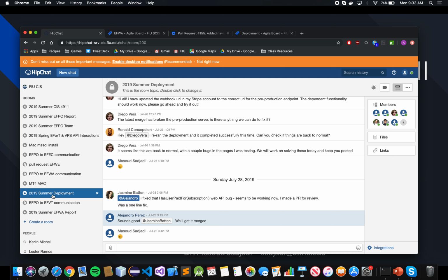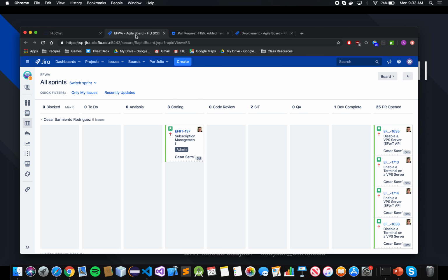Once you have all this done, the second tool that you will need is the Scrum board for the team that you monitor. You need to familiarize yourself with this board on top of your own board. The stories that are here are the ones that you will eventually be testing once the PR is open. So you want to know the progress of the stories. Once the stories are done with the coding part and start going into code review and QA, you want to be alert, because it is likely that the story will soon be on the PR open state, which is this stage over here.